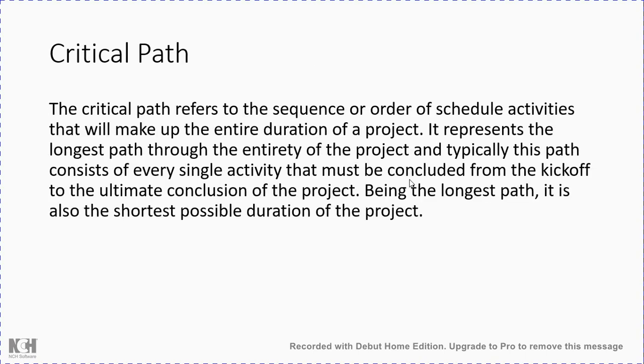Now coming to the critical path, what is the critical path? As shared earlier, the critical path refers to a sequence of scheduled activities that will make up the entire duration of the project. Keep in mind it represents the longest path through the entirety of the project, and typically this path consists of every single activity that must be concluded from the kickoff to the ultimate conclusion of the project. Being the longest path, it is also the shortest possible duration of the project.